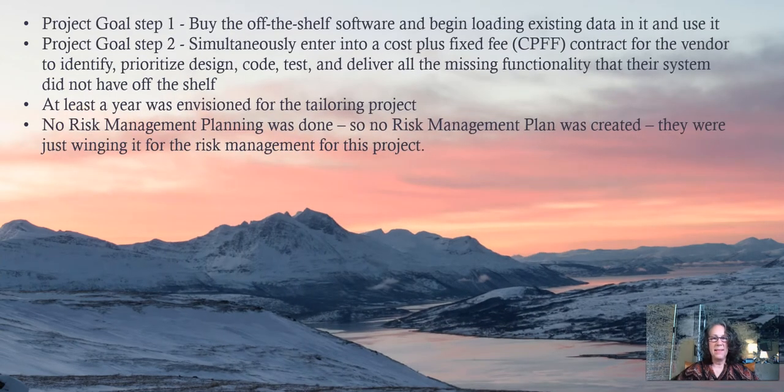So with that as their environmental situation, their first objective when they created this project was to buy one of the off-the-shelf systems and begin loading their existing data in it and start using it. And their idea was that they could begin to garner the benefits of using a new system right away. Well, they also recognized and acknowledged that any new off-the-shelf system was not going to meet 100% of their needs. It was not going to be a complete replacement for their existing system.